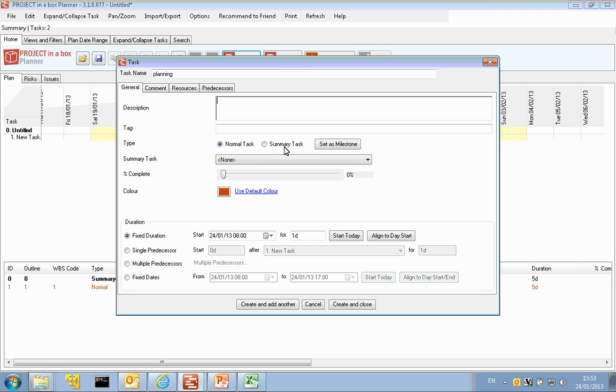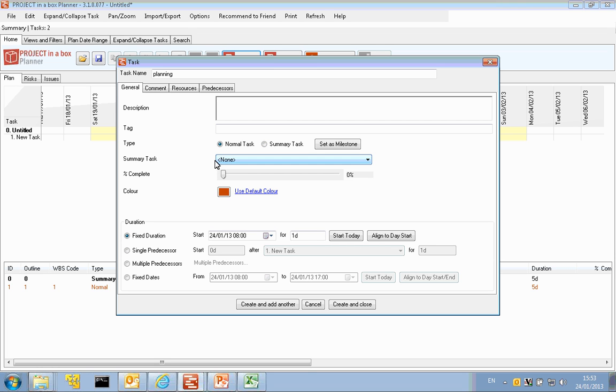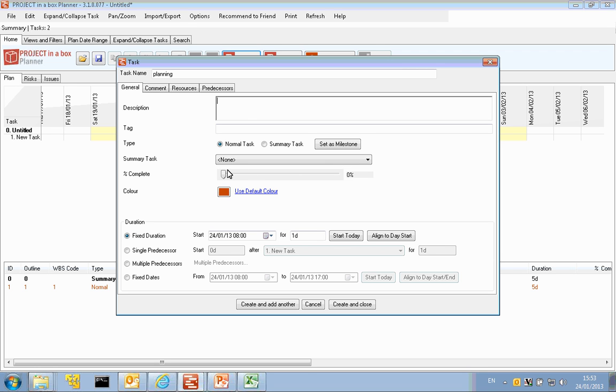We then have the decision about whether this task is a normal task or a summary task. A normal task, we get to set its own percentage complete and start end dates and resource information. Summary tasks, those things are inherited from the tasks that sit within it. Here we have the summary task for this particular task. It's in none because there isn't a summary level. The level zero is all automatic, so we're just going to put our task in at the top level of the plan.